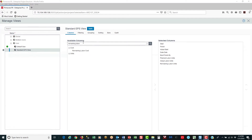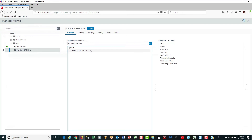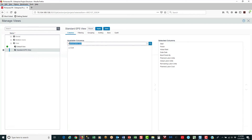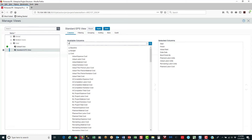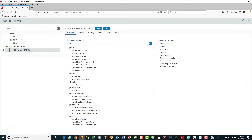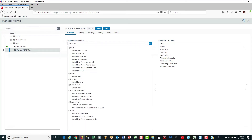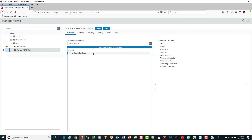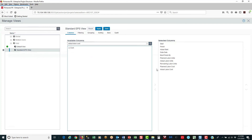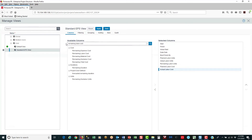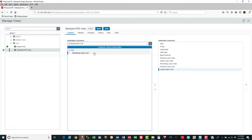Now I want to add some cost columns to my EPS view. So I do a search on planned labour cost, select it, and double click. Then actual labour cost — select it, double click, and it moves it over. And then remaining labour cost — select it, double click, and it brings it over.